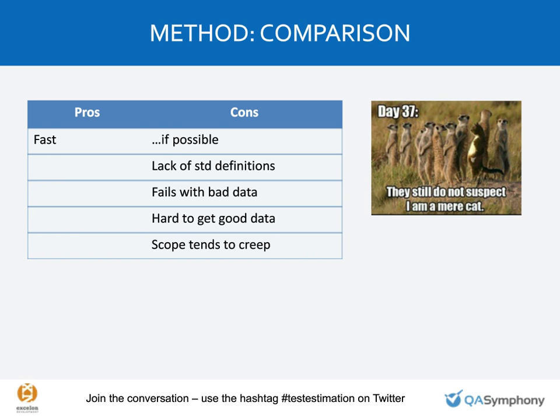Yeah, I think so. When you say steal from Peter to pay Paul, can you clarify that a little bit for me? Are you talking about borrowing resources from other departments to get it done faster than you thought you could? I'll be very specific. You're estimating tasks in hours in JIRA, and you have 40 hours per week, and this task is supposed to be 5 hours. So it really takes you 7, but you have a bucket for administrative time for the week. So you take out of the bucket for administrative time, and so you report 5 hours of the task and 8 hours of admin, when really it was the other way around.